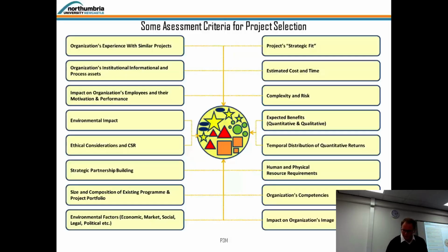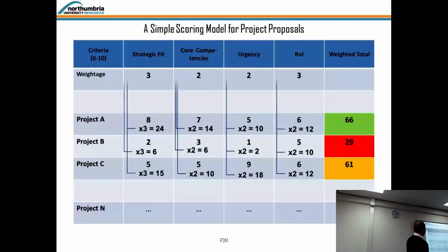And what you would do with the criteria is you would probably make some a necessity for running the project. So if you are after strategic benefits from your project, but they are not profitable, but you need them to actually go ahead. For example, with your factory, this may be initially not profitable, but your return of investment may be generated in 3 to 5 years, or if you are in the food and beverage industry, maybe in 3 months, depending on which company you are. Then you may have that factored in as well as a timeline, right?